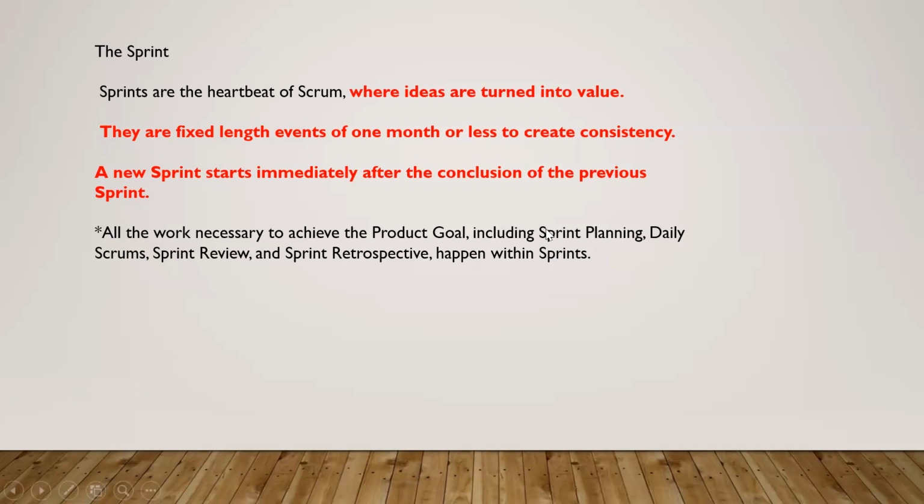So we have something called sprint planning, one of the events where you will break down the whole work into smaller chunks of pieces. Let us say there is a complex task which is going to take a lot of time. Then you will divide that complex task into smaller subtasks, in the sprint planning itself.